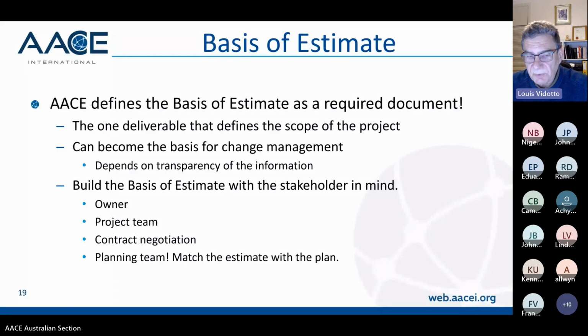I remember on a project where the schedule wasn't finished by the time they got to execution stage, and the planner on that job kept changing the schedule because things kept changing. And at the end of the day, I had to say, look, just baseline it. Just say that's it, and then start your change management. And it's the same with your budget.